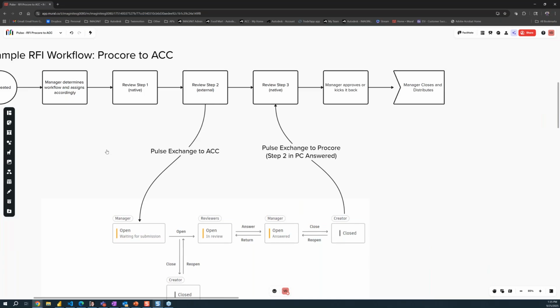We have supported this in some ways. So if your general contractor opens up or assigns you a submittal and you want it to match a review template automatically, and instead of going directly to a manager in a submittal, it automatically kicks it into the first review step, we're getting very close, and I think we're pretty much there on mapping, at least from ACC.